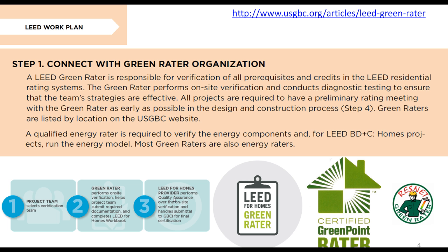LEED work plan. Step 1. Connect with Green Rater Organization. A LEED Green Rater is responsible for verification of all prerequisites and credits in the LEED residential rating systems. The Green Rater performs on-site verification and conducts diagnostic testing to ensure that the team's strategies are effective. All projects are required to have a preliminary rating meeting with the Green Rater as early as possible in the design and construction process.